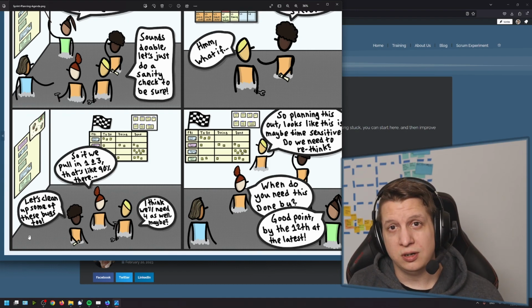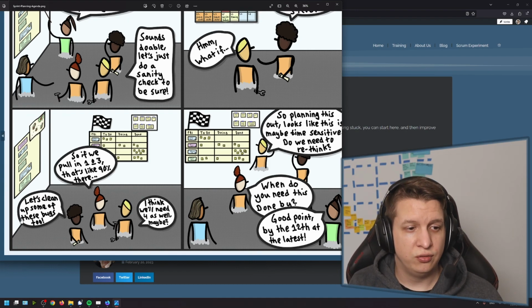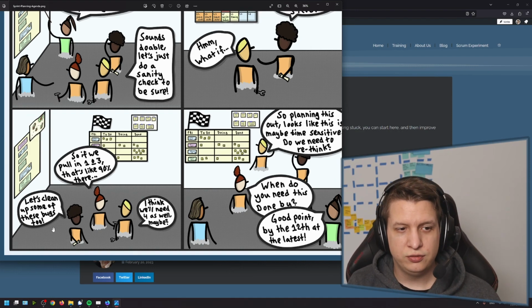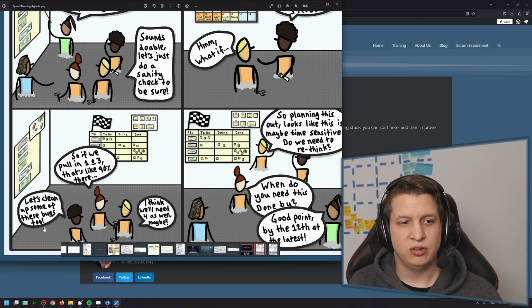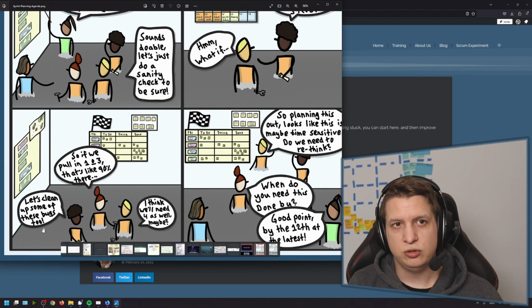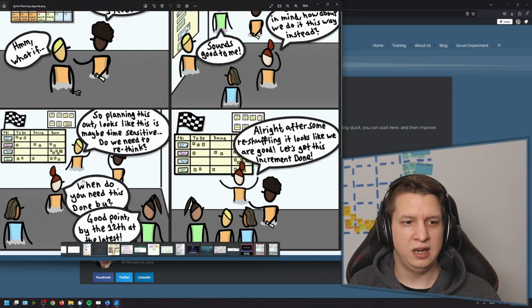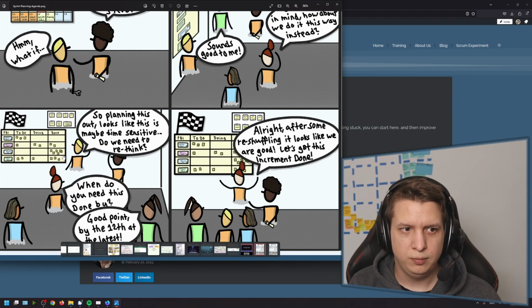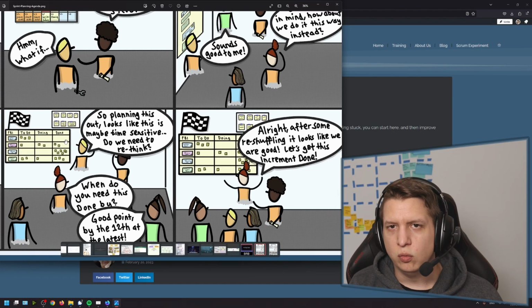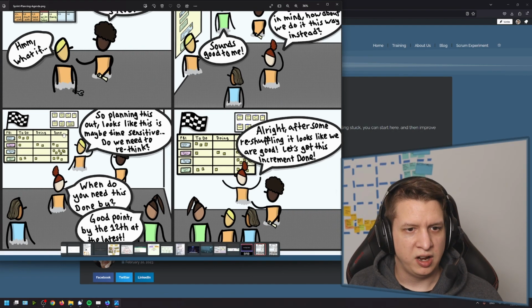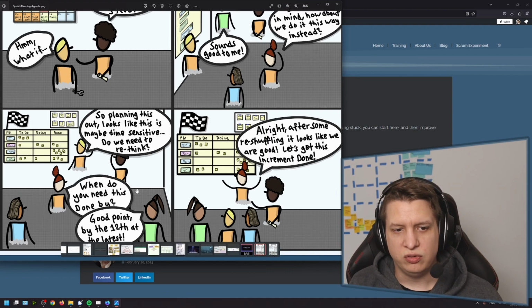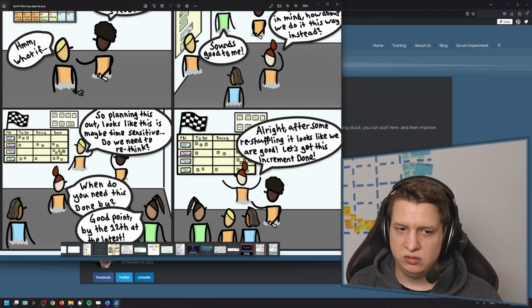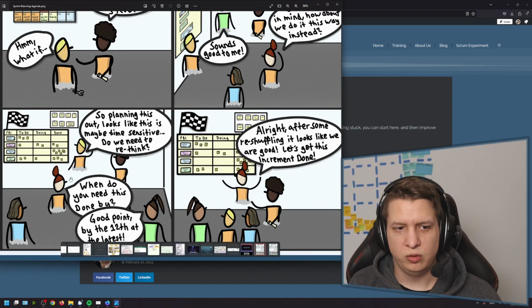And very importantly, you can include stuff that's not directly contributing towards the sprint goal. Doing maintenance, looking after the product and existing increments as well, is part of the work the Scrum team should be doing. And then they go back and they start breaking down into a more detailed plan. Now we're maybe looking at, when are certain dependencies? Are some of them time sensitive perhaps? Do we need to rethink certain things? And again, they just check in with the product owner. If they're not sure or they want to just double check, always a conversation, right?